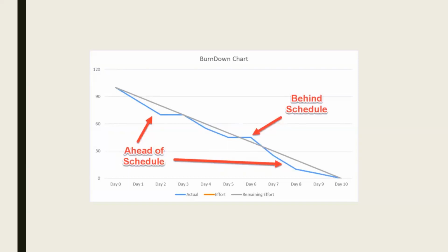Because velocity is going to be different, right? In the last sprint you may have delivered 5 user stories, and in the previous sprint you might have delivered 2 user stories. By that, we can't say your performance just decreased from 5 to 2, and you're not doing good, so I will give a rating of 2 out of 5.